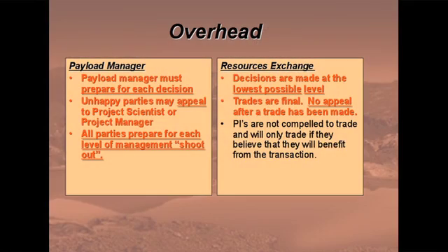Here, decisions are made at the lowest level. They're basically made by the PIs. Trades are final. There's no appeal. PIs are not compelled to trade. They only trade when they feel that they will benefit from the transaction. I mentioned this before.